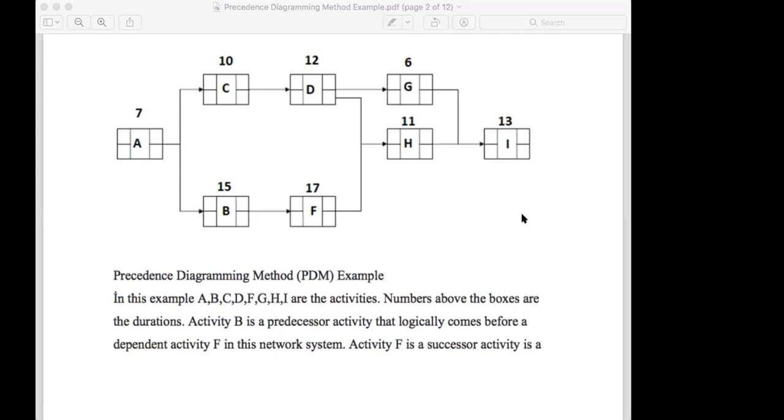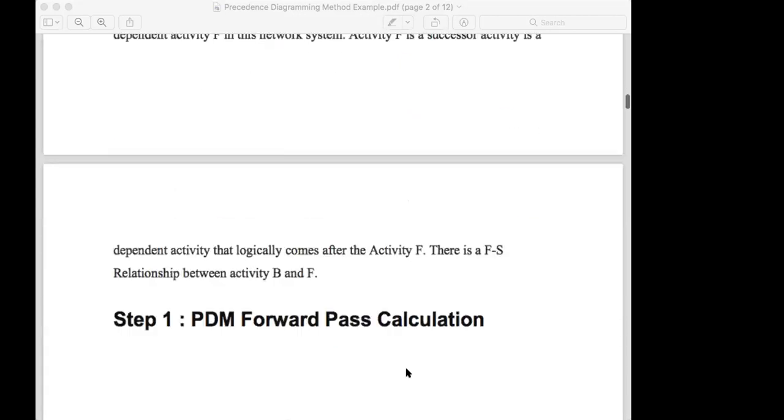So if you have forgotten these relationships, you have to go to the sequencing activities again, and you have to calculate lags, leads, what are the lags, leads, and like that. You have to go through all these things. So it is very useful because you should understand that first. Normally you get finish to start most of the time. Start to finish you don't get වැඩිම නෑ උනාට, but finish to finish, start to start, those things are common. So those things you have to learn.